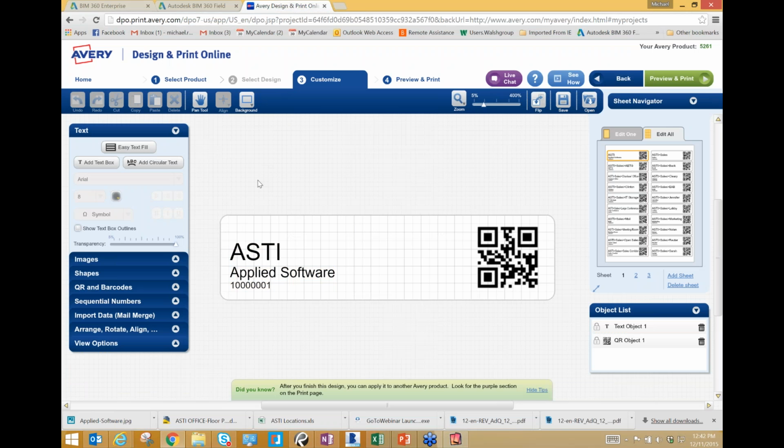So what we suggest is you use barcodes going forward for all your locations. The reason we suggest that is because it's really going to streamline your site walk workflow, which we're going to go over later. And how does it do that? Rather than having to search for the location and then create the issue, you just scan a barcode, the location shows up, and then you can start generating content for your issues.